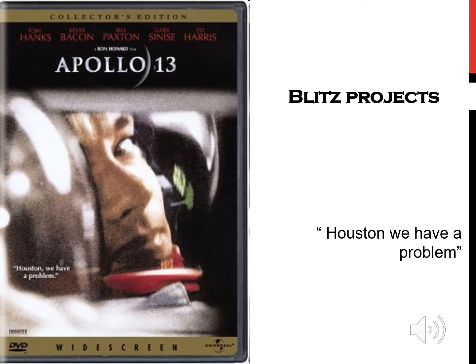Blitz projects are the most urgent projects. They are usually initiated in response to a crisis or the result of a natural or unexpected event. The most famous classical example is the case of Apollo 13. The fuel tank exploded in the spacecraft and they had just a few hours left before oxygen and power ran out, so they had to solve the issue as soon as possible. Other more down-to-earth examples include the case here in Australia when ATM machines of a bank just stopped working — this is a blitz project because they need to rush and fix the problem as soon as possible.